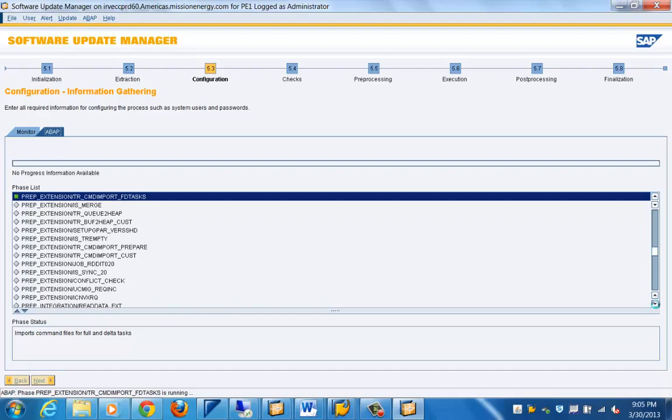And we just need to make sure that we identify these things in time, upfront, because otherwise the upgrade may get impacted, and if it is a production system, we may end up getting into the production downtime window, because we are looking at key phases that could take about 24 to 28 hours, which may impact our go-live schedules. So that is extremely important. Just make sure that we take the right decision at the right time, so that we don't end up losing data, and we don't end up eating away time.